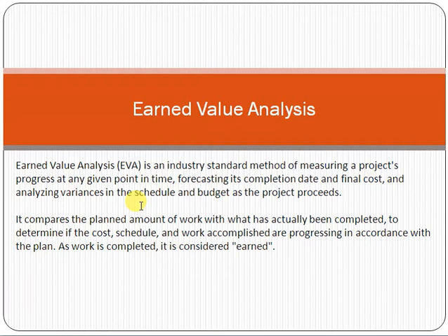So this is a very simple example of earned value, friend. Just try to focus here: what you have basically done is compare the actual work versus the planned work, and then calculate the progress or performance accordingly. The same thing happens in a project as well. The planned work was 10 kilometers within 1 hour, however you completed only 5 kilometers. That means you are behind schedule, and you must take corrective action, otherwise you will not reach on time.